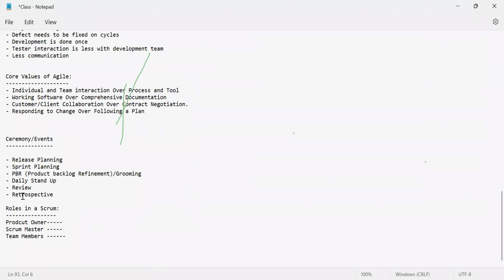If a change happens, definitely stories will be added to the sprint backlog, which means that we as engineers will have more work. If the project has to be completed in 5 sprints, now it's going to take sprint 6. So that is review. The work done during the sprints is reviewed by the end of each and every sprint. It should be showcased to the product owner as well as the team. What is a retrospective?